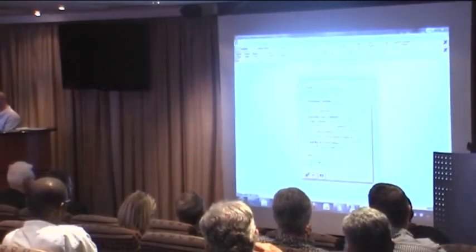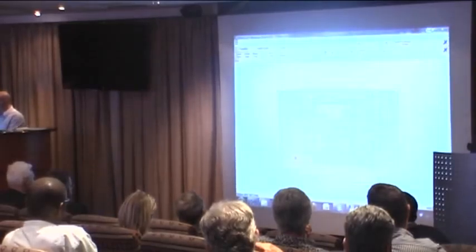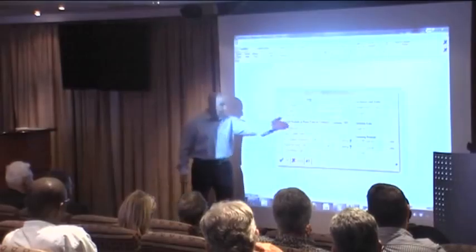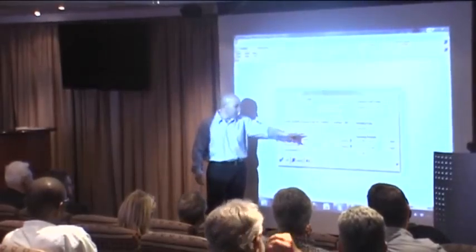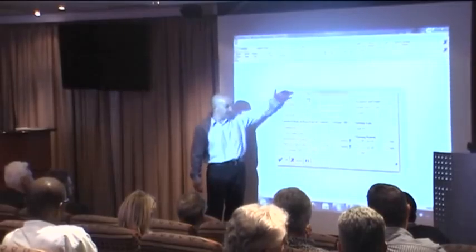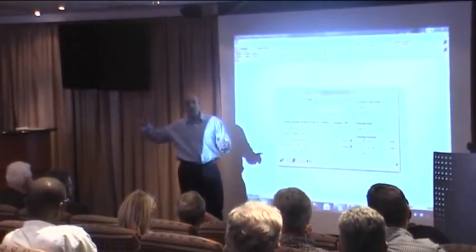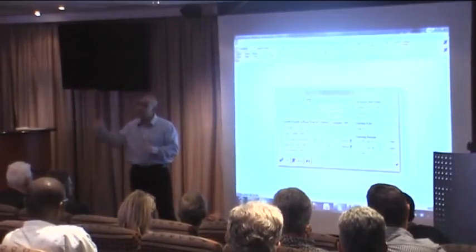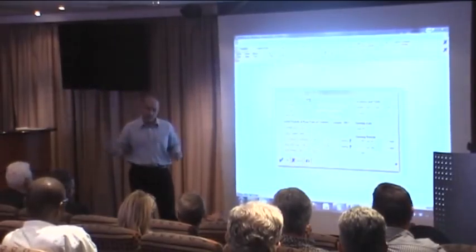Valuation, cap rates, and then it's going to go through all the rental income and operating costs. It's going to ask you per tenant: what is my rental income, what's my lease term, what's the base rental, what are the recoveries, what are the escalation rates, vacancies. Take all your different leases, roll it up, calculate it in your first year, roll that up into a 20-year cash flow, and show you all of the different reporting.